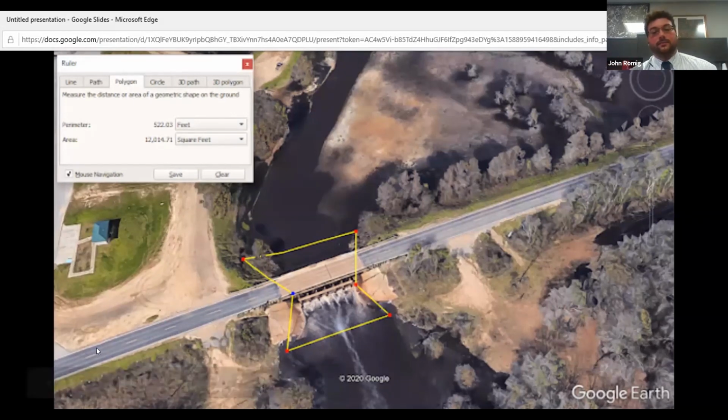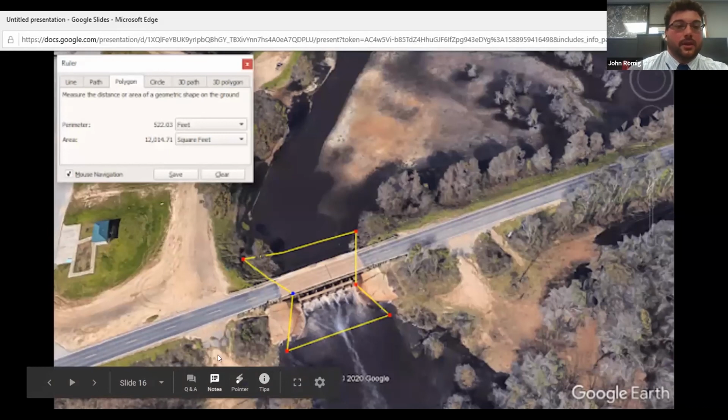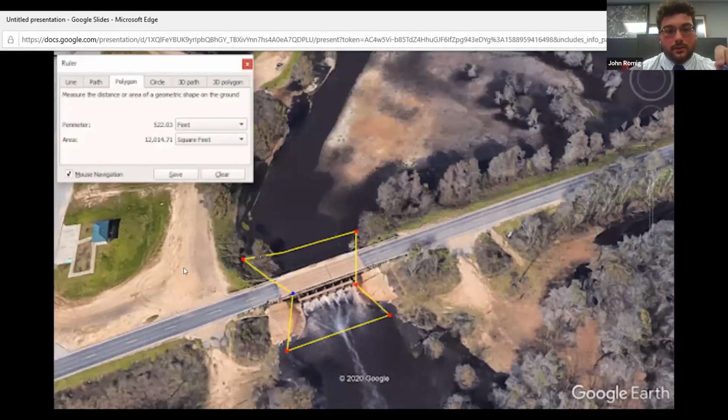And then, as you see to the left, we came up with a cool little idea. We could utilize the public gravel lot that's right there as a laydown yard. It's state-owned property, and it would be helpful to lay down our pipes, the grates, any forming material, any box with tools, and anything that we would need to leave on the site.